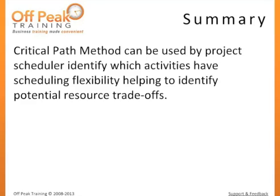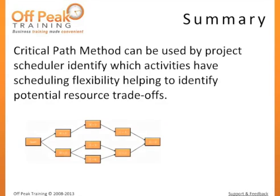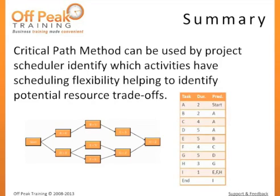Project schedulers can use this information to help make decisions when allocating resources or considering other tradeoffs regarding the project schedule. Once project execution is underway, the project management team must recalculate the critical path during the controlling processes, as it may change as activities are finished early or late. For the exam, you will need to be prepared to identify the critical path when presented with a network diagram. You may also be asked to identify the float of a single activity node, or to solve for the critical path or float based on a table of data rather than a network diagram — in which case you will need to draw the network diagram manually and execute the steps in this lesson.